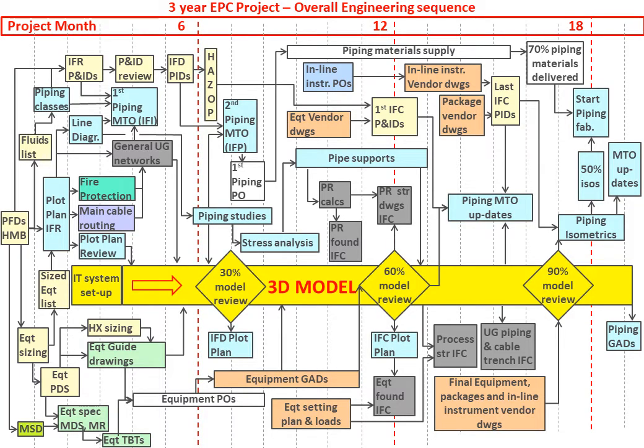The timeline at the top shows the typical schedule for a three-year EPC, so you may adjust it depending on your project duration. This synoptic shows all key sequences and all key interfaces between disciplines, which are shown in different colors.